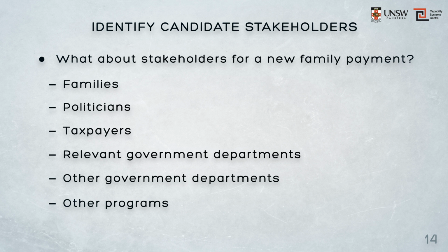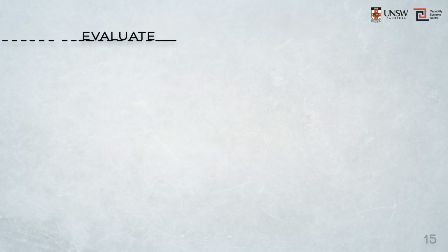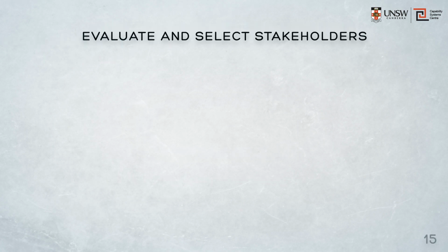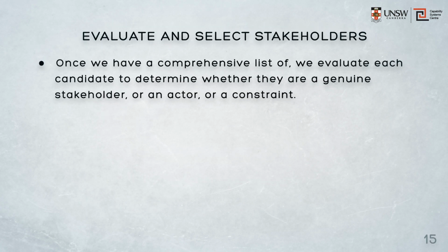The broader the group of stakeholders, the broader the ranges of interest, the more difficult it is to collect those requirements. The other lesson to observe is that regardless of the nature of the project, we need to identify candidate stakeholders and then to evaluate each to determine whether they're a genuine stakeholder or whether they're simply an actor in the system, or whether they are placing constraints on the system in terms of the way it should operate or the manner in which it is to be deployed.